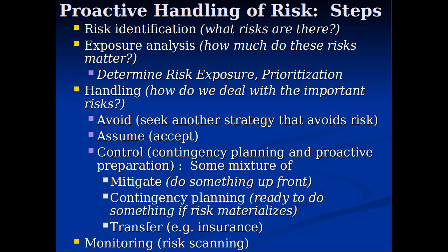So what do you want to do here? You want to identify the risks, you want to determine which of them are big risks. How much do these risks matter? And basically what you're going to do here is determine, at least roughly, low, medium, high, that's fine for this class. What's the probability of this happening, and what's the severity if it happens? Mark my word. The prioritization is going to come out of two things.